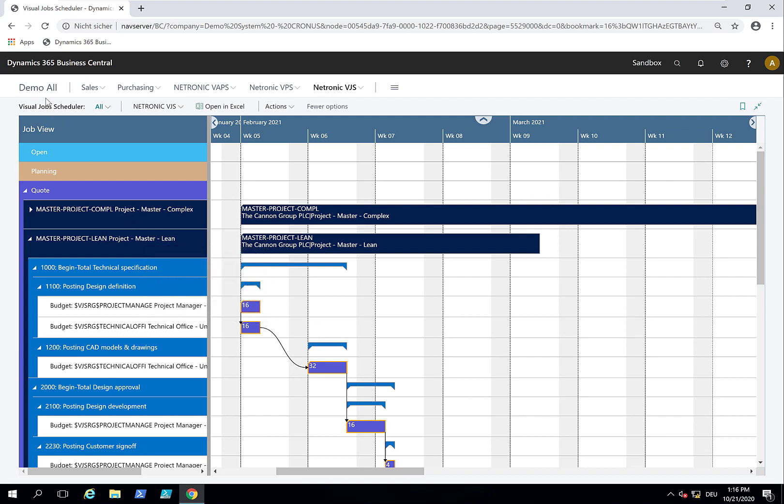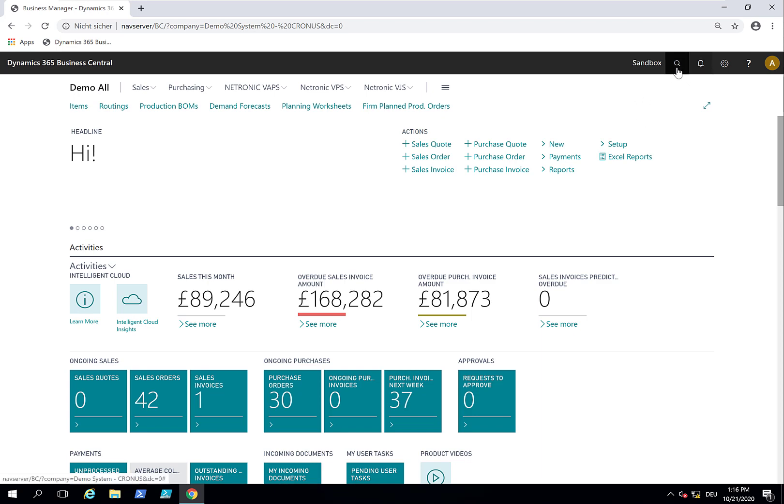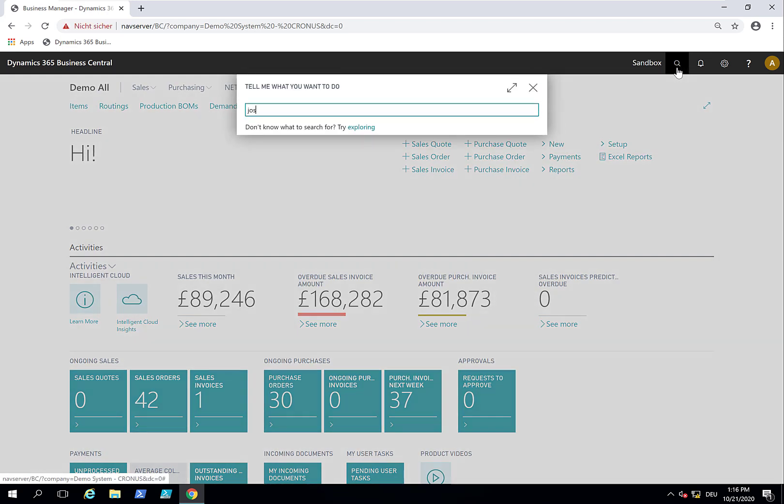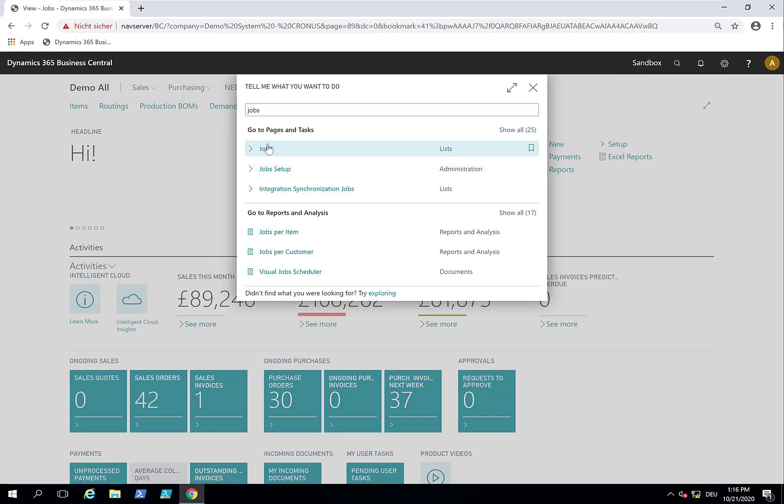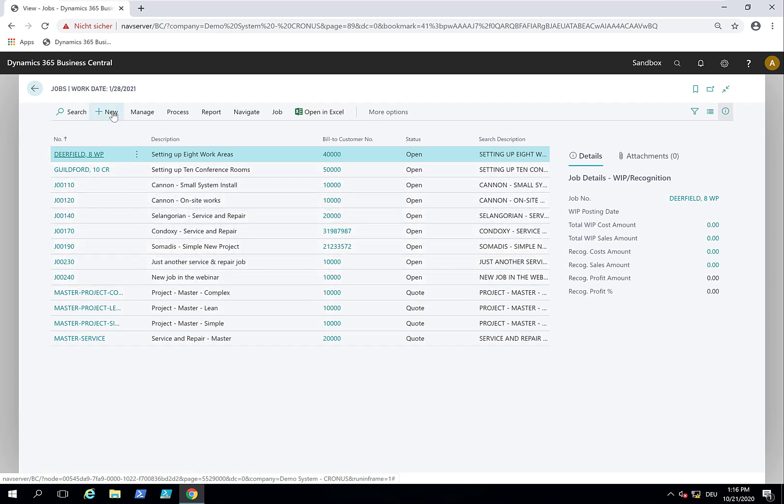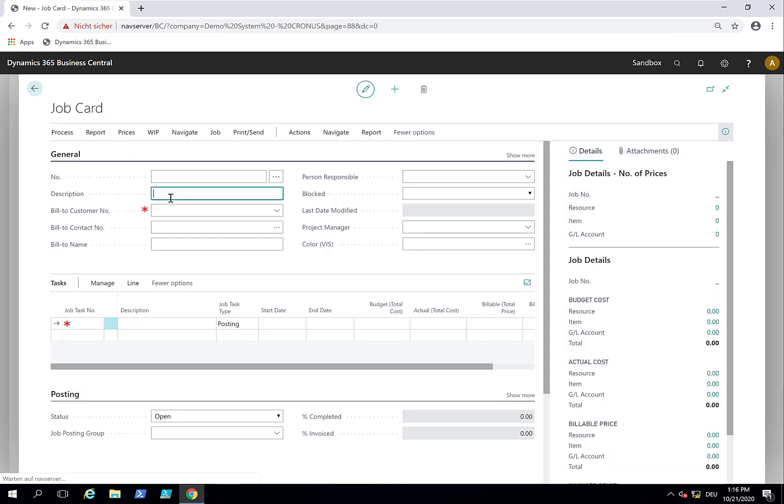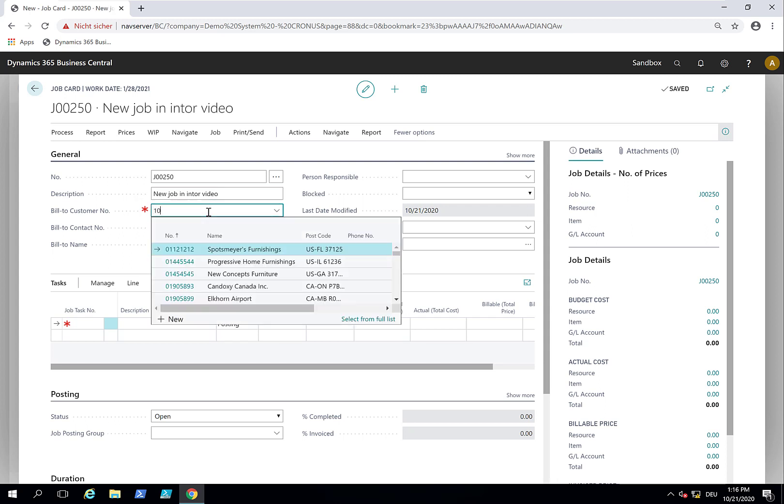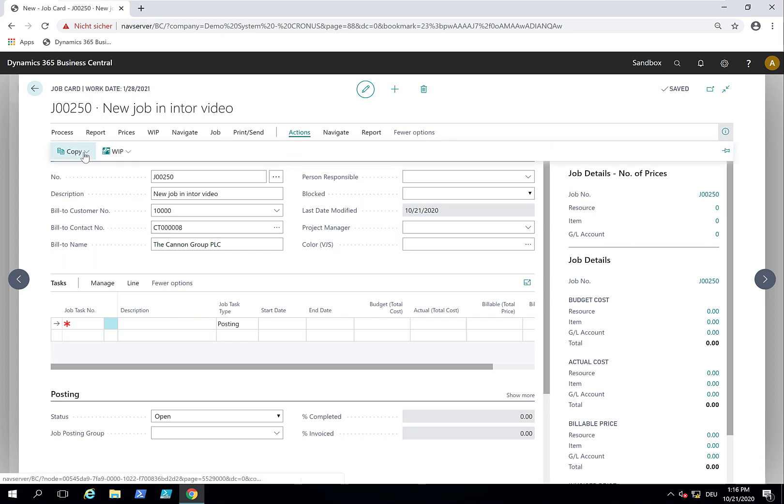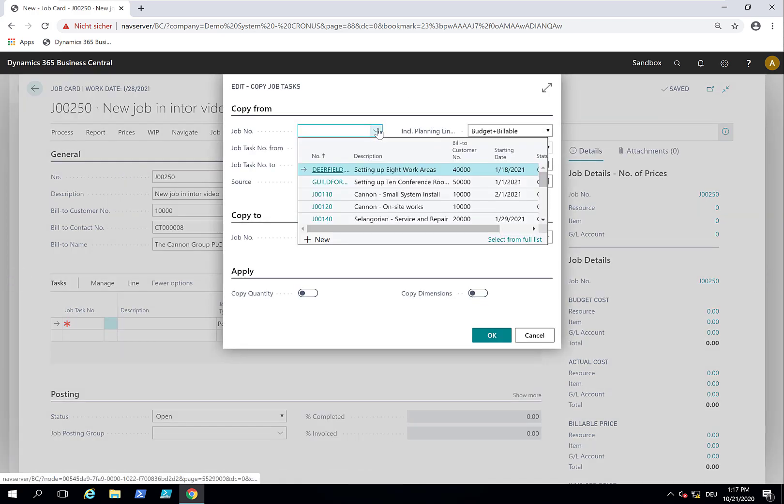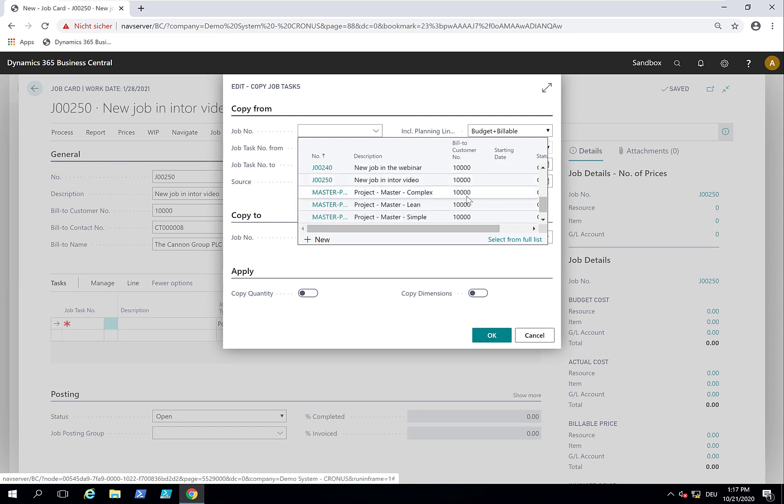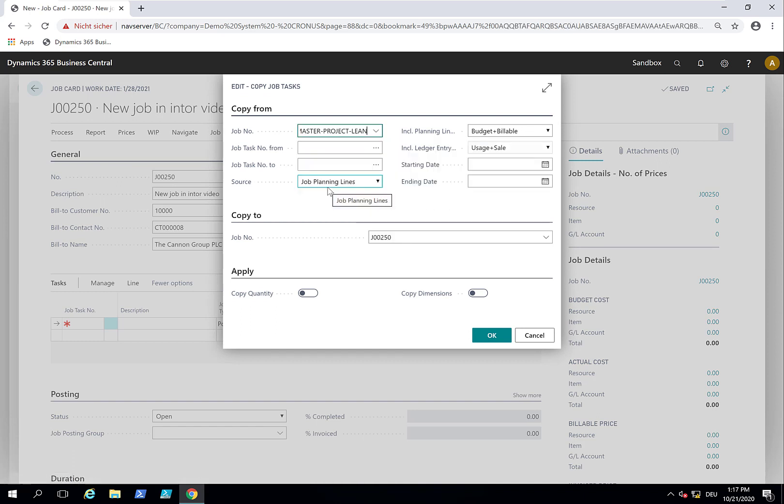Based on this template, I will now create a new job. I leave the Visual Job Scheduler for a second and enter the standard job functionality. We create a new job. I have a list of jobs - some are templates and the ones starting with J are my regular jobs. I create a new one called 'new job in intro video' for the Canton group, my number one customer. I want to copy the job tasks from my template job, so I go to the standard Business Central functionality, 'copy job tasks from,' and select the project master lean template.